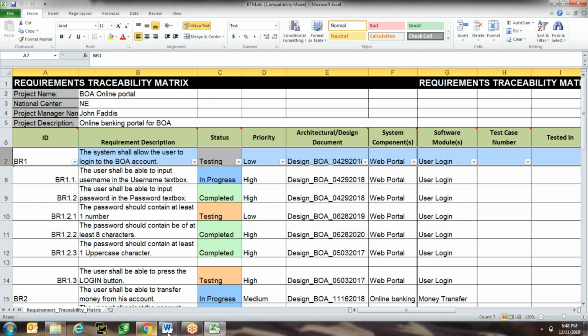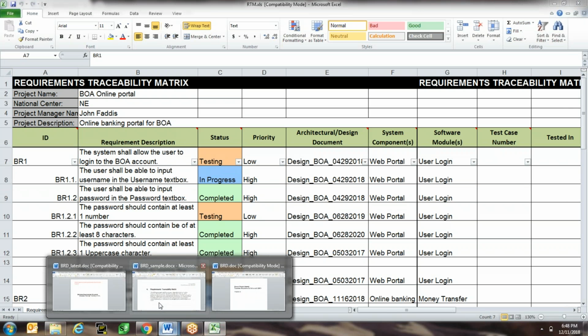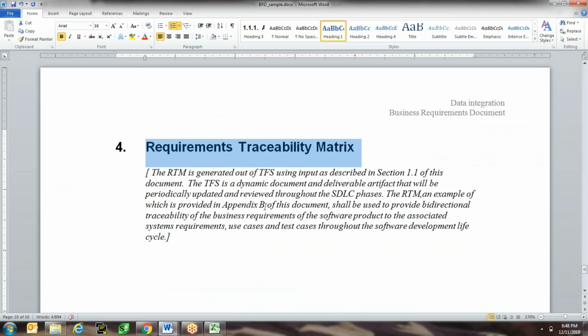This document comes out here. So you can imagine the list of your requirements is a small part of your BRD. There's a whole lot of information: in scope, out of scope, as-is scenario, to-be scenario, assumptions, constraints, dependencies, what's the problem, what's the solution, summary of the project, all those things. You own it, you document it.